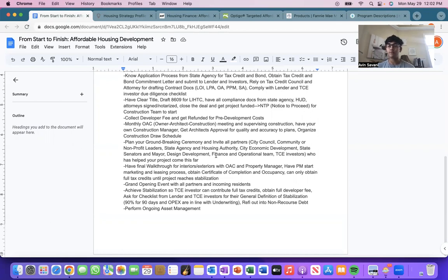And then the MEP work, the furniture, fixtures, and equipment, the interior and exterior finishes, and the landscaping, that's the other 50%, right? So as the property and the project progress, having that construction draw schedule in periodic payments is a better strategy to compensate, I think.